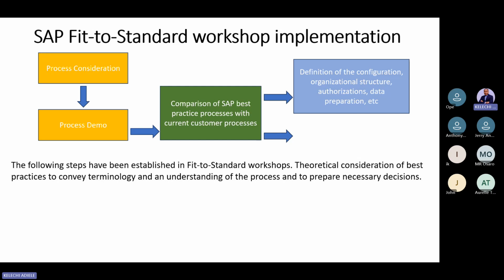Once you have identified these gaps and determined how you're going to close them, the next thing we move to is configuration. The functional consultants and technical consultants are actually waiting for the BA to conclude deltas and gaps, standards and gaps, so that they will start picking the standard process and start configuring while you're doing the analysis for the gaps on how to close them. Once you are done with the comparison, the fit to standard work and the fit to gap assessment, then configuration starts. Then once configuration starts, we have to pack all the delta requirements.